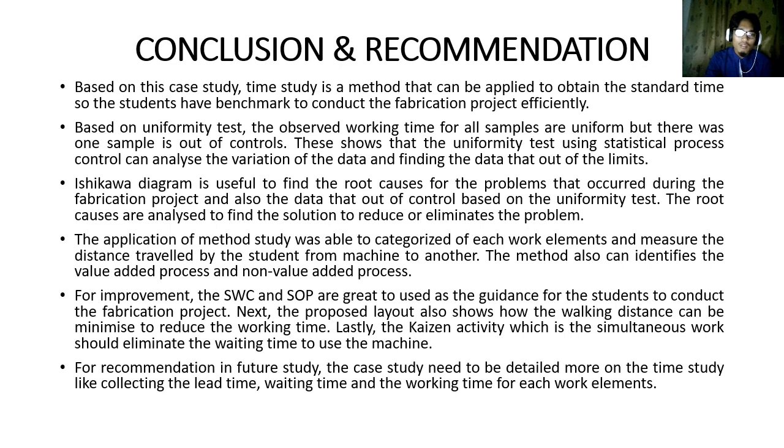For improvement, the SWC and SOP are great to use as guidance for the students to conduct the fabrication project. Next, the proposed layout also shows how the working distance can be minimized to reduce the working time. Lastly, the Kaizen activity, which is simultaneous work, should eliminate the waiting time to use the machines. For recommendation, in future study, the case study needs to be more detailed on the time, like collecting the lead time, waiting time, and the working time for each work element.